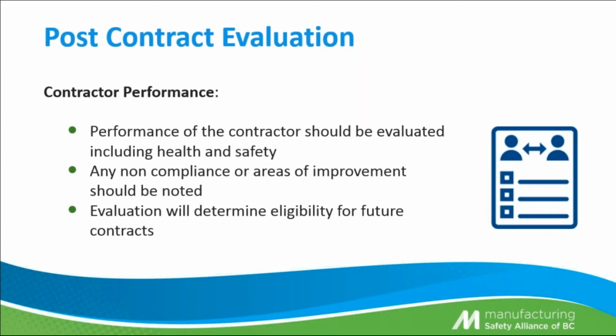Once your project is complete, it's important to do an evaluation of your contractor. You need to evaluate the performance of the contractor both in the task involved and the health and safety performance of getting that task accomplished. Any non-compliance or areas of improvement should be noted for future contracts. Remember that when you're awarding future contracts, this evaluation could determine the eligibility of those contractors.